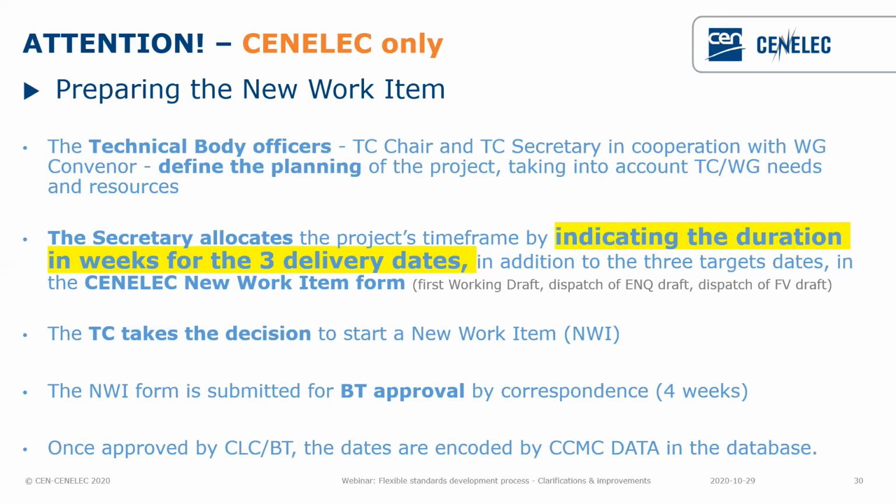Indeed. So basically, the first part is the same as for CEN. It's the same principle. It's up to the technical body officers with relevant conveners and experts to define the planning of the project, taking into account the needs and the resources. And there, it will be important for the secretary also to decide about those 3 delivery dates. And what is important to know is that in CENELEC, the activation of a new work item is not a delegated decision to the TC, because this is a step which requires the approval of the BT.